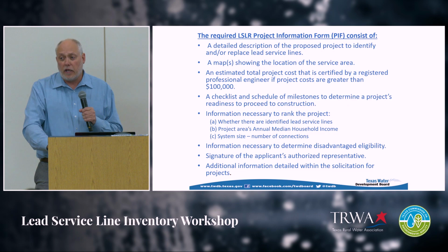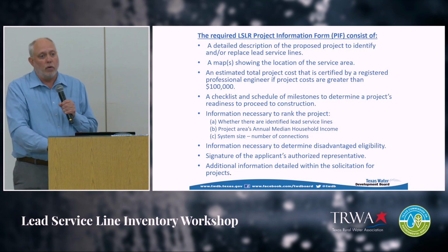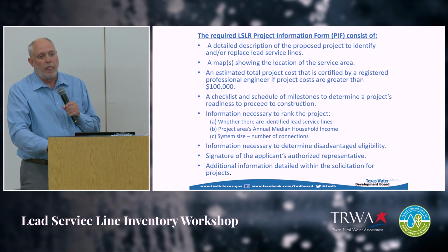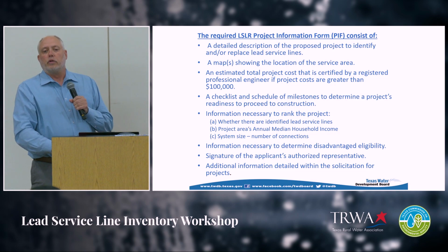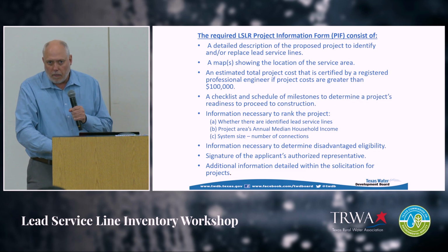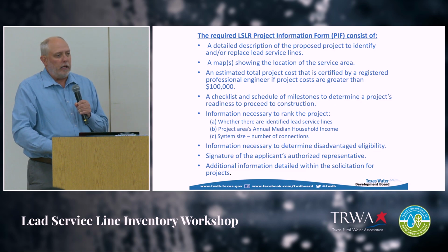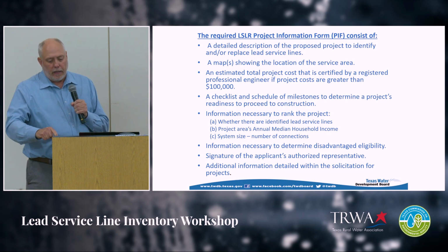If it's less than $100,000, you don't have to have a PE sign and seal it. That's just the project information form. Now, when you go to the formal application, a PE would have to sign and seal the formal application. Let me tell you about that.